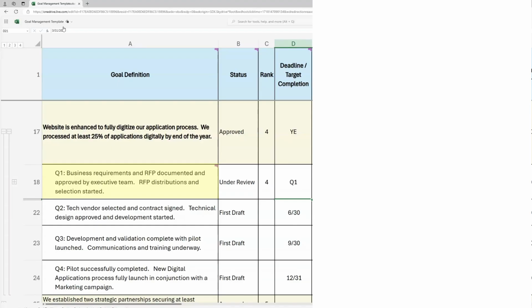Don't get too caught up in getting your milestones perfect. The idea here is to identify the critical path deliverables and set some target completion dates to act as guideposts. The details will be identified through project management processes.